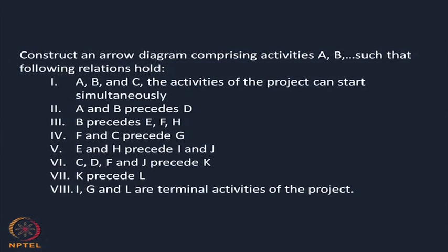Then I am telling A and B precede D. That is, before D starts, A and B must be completed. Similarly, B precedes E, F and H. That is, before starting of E, F and H, B should be completed. F and C precede G. Then the next one is E and H precede I and J.